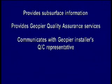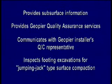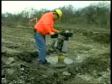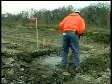This communication includes verifying correct drilling depths, confirming GeoPeer installation procedures, and recording the number of GeoPeer lifts. If any significant differences in subsurface conditions are encountered during drilling, this should immediately be brought to the attention of the GeoPeer installer and his QC representative. The geotechnical engineer is also responsible for providing later inspections of footing excavations to assure that exposed soils at bottoms of footings and the tops of GeoPeer elements are compacted properly with a handheld mechanical jumping jack type compactor. A sled type vibratory compactor is not satisfactory.